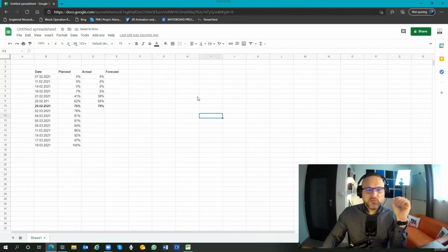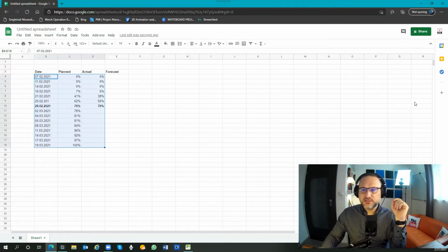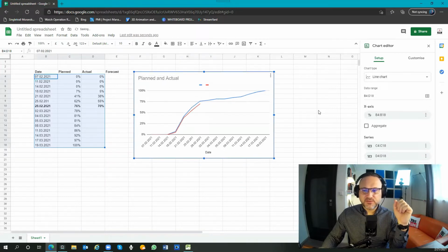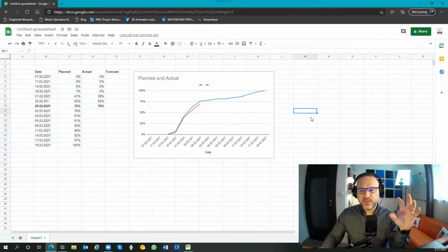So you can make simple table over here. If I will use it this way, and I'll put insert chart. Okay, so you can see a simple table by Microsoft Project and Microsoft Excel, which is telling you the dates, the planned. This we call it the S-curve. The S-curve is applied same for the time, also for the cost. We will come for the cost in the next episodes.